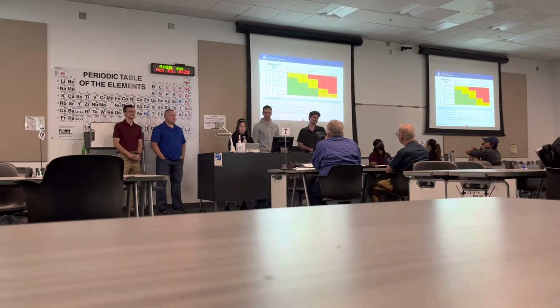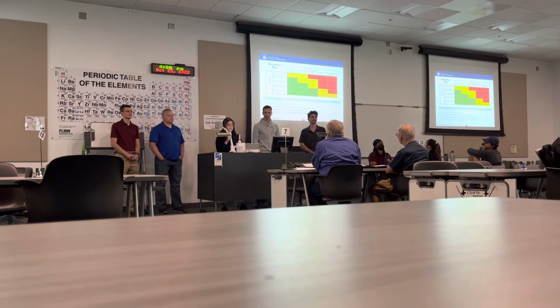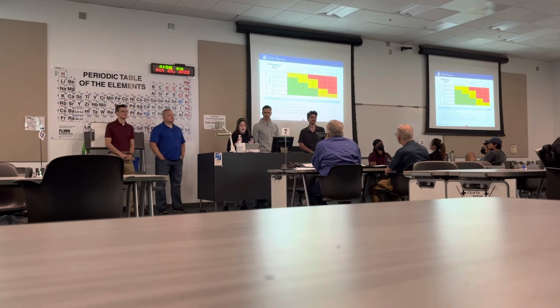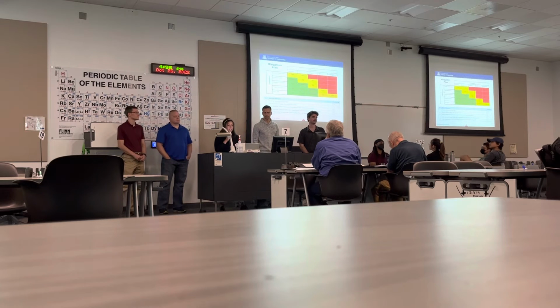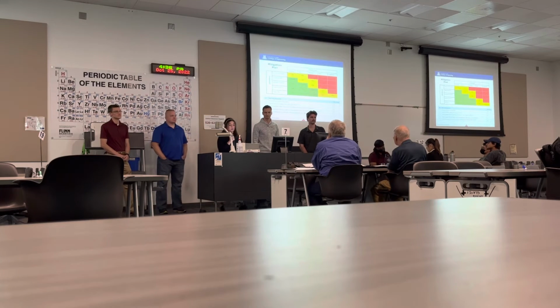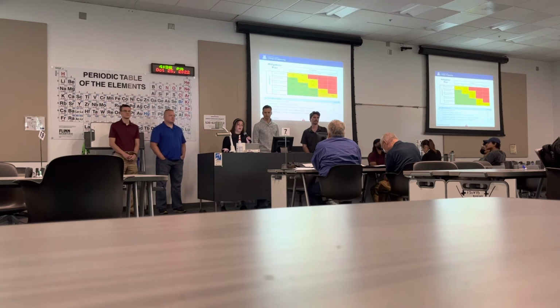For our risk number 2, our device sensors might not work with saliva. So this would be a major consequence, but it's a moderate likelihood, which gives us a risk score of 12. Our third and fourth risk have the same score, being 8, because they both have major consequences, but they are pretty unlikely. And that's the links between blood values and illnesses for the app might be incorrect, or the links between the illness organ and supplements for app might be misunderstood. Our last risk is the value association in machine learning algorithm for website might be off, and that is also a moderate consequence and a moderate likelihood, which gives us a score of 9.